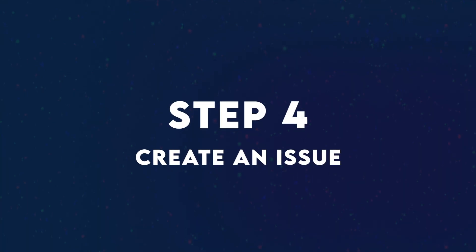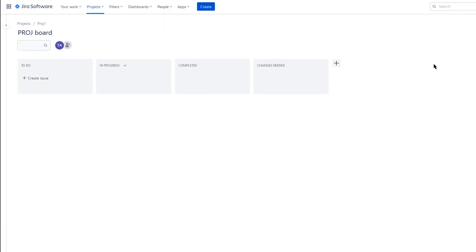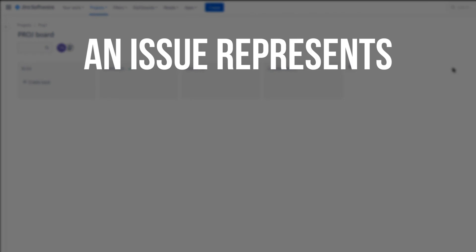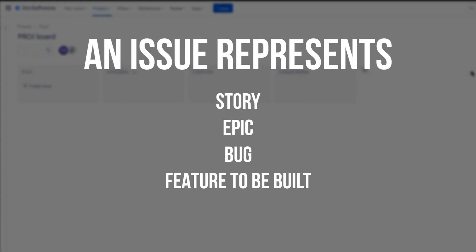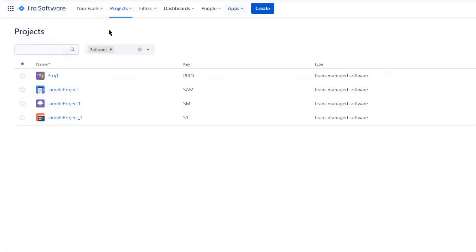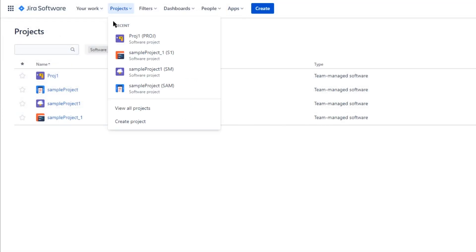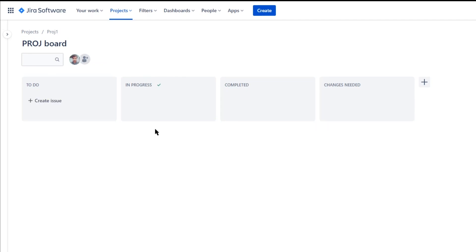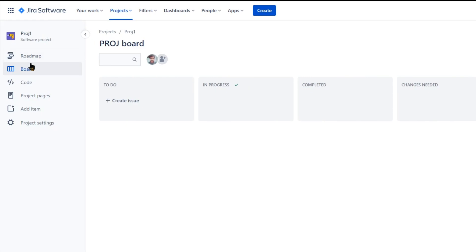Step four is creating an issue. Issues are the building blocks of your Jira software project. An issue can represent a story, an epic, a bug, a feature that you want to build out, or any other individual task in your project. Select boards in the project menu on the left, hover over your columns, and click add. You can also add larger projects to your roadmap by clicking roadmap in the project menu.